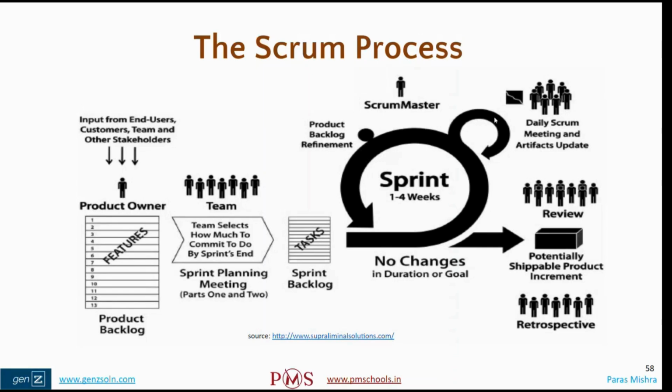This is the representation of daily stand-up meeting. Okay. Daily Scrum meeting. What is happening here? I guess somebody was asking what has been achieved yesterday, and the word used is achieved. We do not say, I attended yesterday's stand-up meeting. I attended an architectural meeting. I reviewed the document. That is not your achievement. That is work in progress. What did you achieve yesterday? That is discussed. What is your plan for today? What are you going to achieve today? And in your today's plan, what is your dependency? What are your roadblockers? These three things are discussed here.